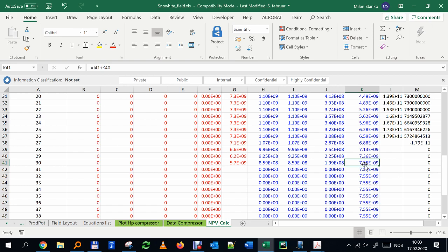Essentially, we have different types of taxes. One is on the gross sales that I get. And then I have some on the net income, a percentage of the net income, and those percentages can change a bit during the first years of production. I get some tax incentives where I pay less initially and then I start to pay more and more. But it's not so simple as to include it as an OpEx. But OpEx affects my net income, the net income over which the tax is calculated.